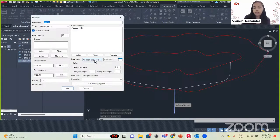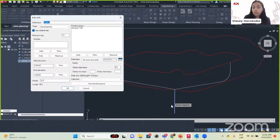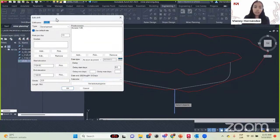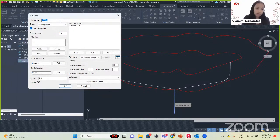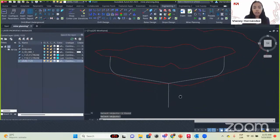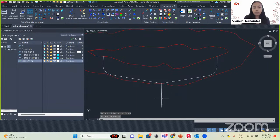After selecting the predecessor, the date changes — it will not start until after we are done with this one. So when we finish, we will go in both directions simultaneously. This only depends on mine decisions. I'm just showing you what you can do. We click OK and that's how we create our drift.